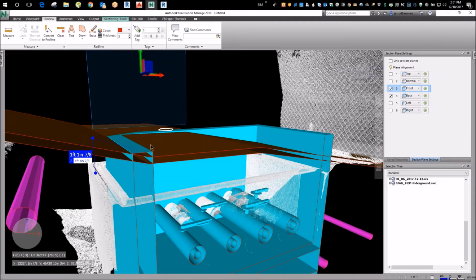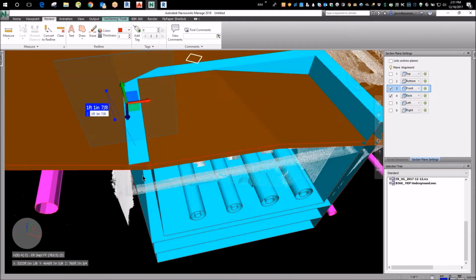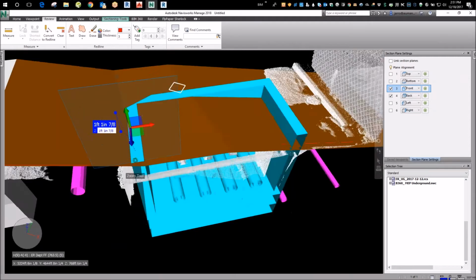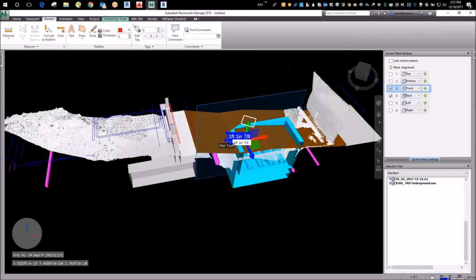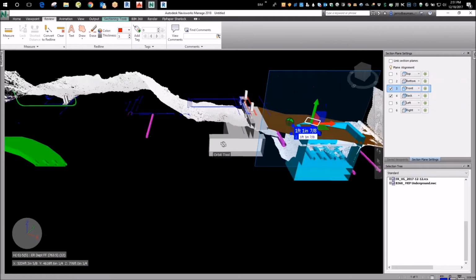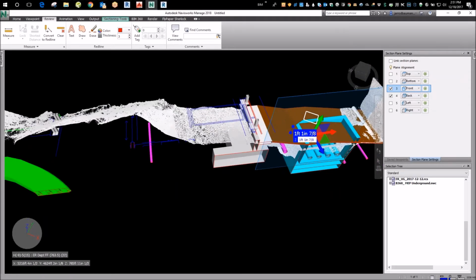So we obviously don't have to move everything, but the stuff that's critical in walls, that's on the surveyor. These guys are having to fix it, and it's going to be a bill to the surveyor. That's an expensive bill. Yeah, and we caught it early. Who's the surveyor on this? F3. They're on this one, an ACE. Okay. So good thing to know that the BIM department can check your survey control.